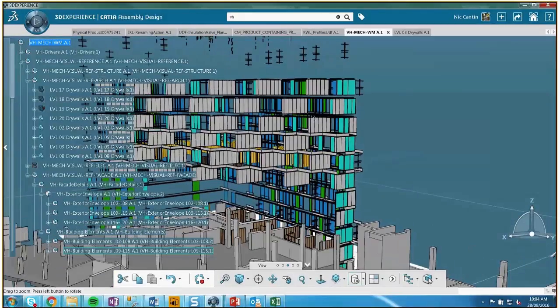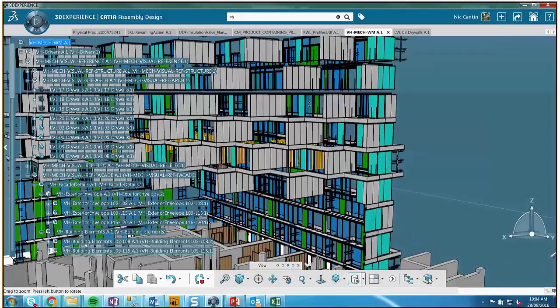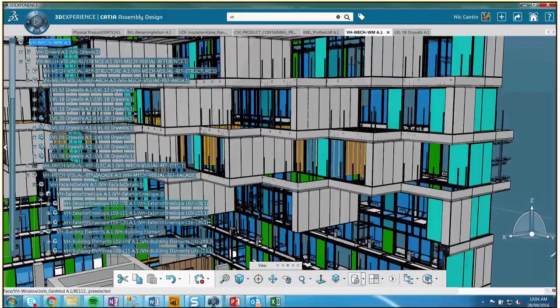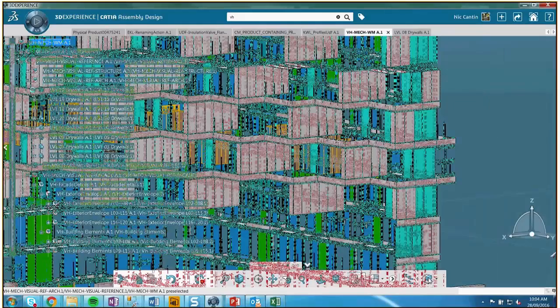So we've broken it down into: we run a starter track, the top track, the actual panel, the cover panel, and then the soffit. So there's a 5-step scripting process to each panel, each floor. And then because it's got more of a twisting kind of geometry.